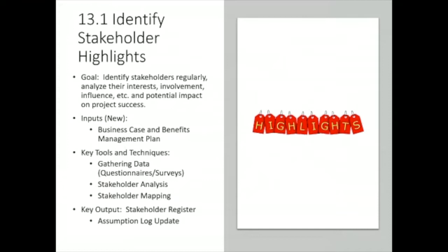If we don't identify stakeholders and let them know early on, this is the project and this is where you fit, then this is an accident waiting for a place to happen. So this identify stakeholder step is going to result, if you look at the very bottom of this slide, in a stakeholder register. And this register is a list of individuals. Now, idealistically, what you want to do is define what their roles are, where they fit in the project, and have a meeting before the meeting.